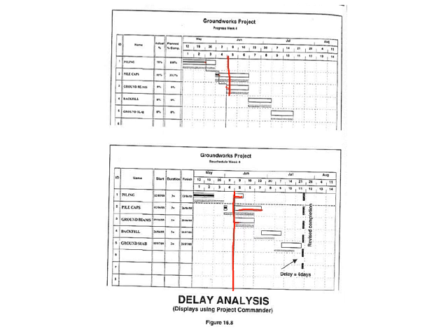Okay, so that can start on that delay, and then you can see that this item's moved out. Okay, so this is still on the baseline. This one moved out because that one is linked to that one, and that moves out, and that one is linked to that one. But you can see your baseline stays intact, and it shows this was your planned program which has been extended. Okay, fairly straightforward.